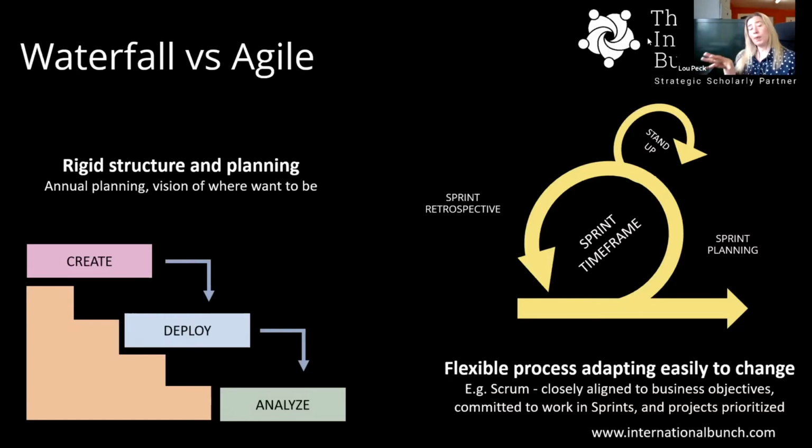And then you have touch bases with your team throughout that time on a regular basis, which are called stand-ups. Now, the reason that they're called stand-ups is because if you've ever joined a stand-up from a development side before Agile marketing really began to be adopted, it's where you actually go into a room and you stand up. You don't get comfortable. You literally have a 15-minute catch up with your team and say, what did I work on yesterday? What am I working on today? And do I have any blockers? Everybody has the opportunity to give a very brief update following those 3 rules.